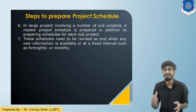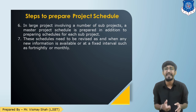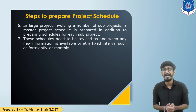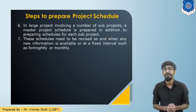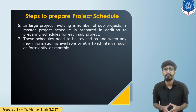From the network diagram, a month-wise or week-wise schedule is prepared. If there is a large project involving sub-projects, a master schedule is prepared in addition to the sub-project schedules. The last step is that these schedules need to be revised as and when new information becomes available to the planning department. That is your step-by-step process of project scheduling.